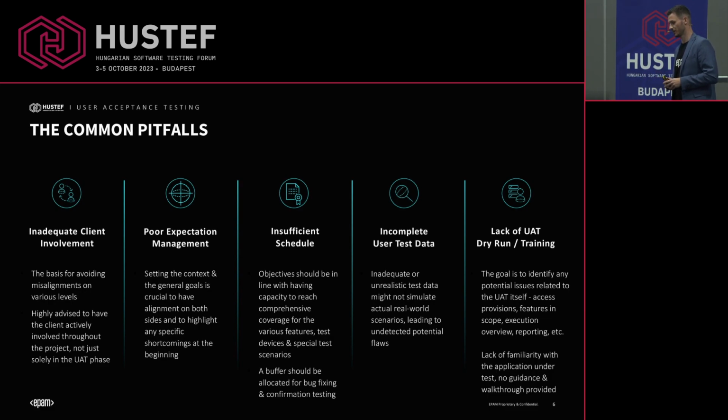And the last on this slide is the lack of UAT dry run and training. So based on my previous project, I had the experience to work with people in the UAT phase that were non-technical people. So it was really important to have kind of a showcase, a trial, and a walkthrough in order to improve the testing efficiency and make sure that our life will be easier.